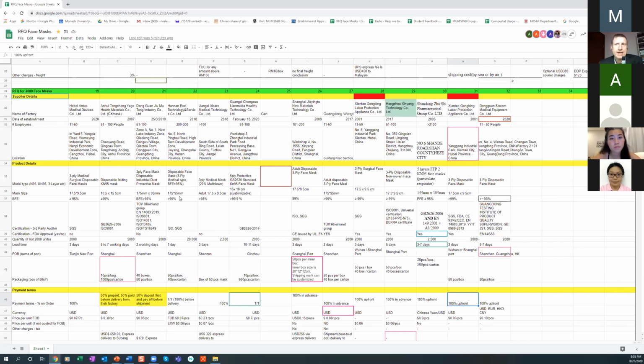True. And the prices you see here, maybe you get one order with them, right? And then you go to do the next order because now you trust them so much because you got a good price. Suddenly it's 10% more. And you're thinking, but it's going to cost me more to try and find another supplier now. I might as well just pay the extra 10%. So you don't know. The price is never a good indication of whether a supplier is good or not. Sometimes they put in a low price to catch you, like a fish trap. And once they catch you, you're stuck because you've invested all this time and energy and resources to decide, oh, there's our supplier. And then that costs you money if you want to change suppliers.